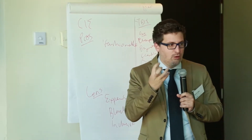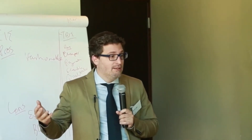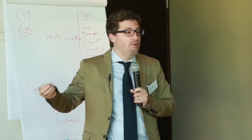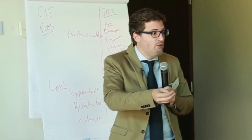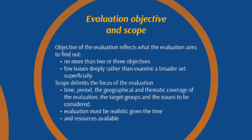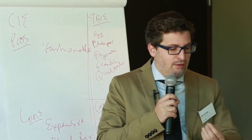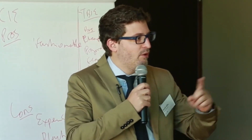The main purpose might be to understand the impact, to be compliant, to understand the risks, or to look at the implementation — but for your evaluator, it's much easier if you have a clear objective. For the scope, it's again very important because it limits the focus of the evaluation. You always have to have a time focus, a period focus, a geographical focus, and a thematic focus. All these things have to be clarified.